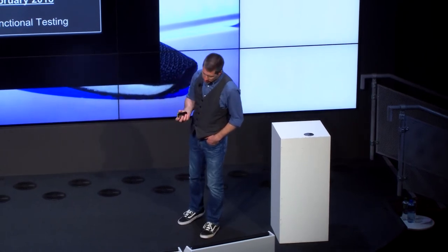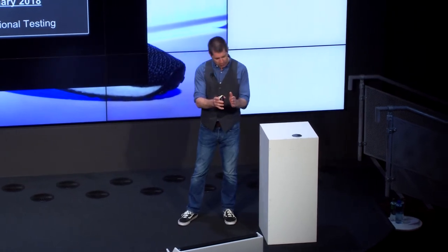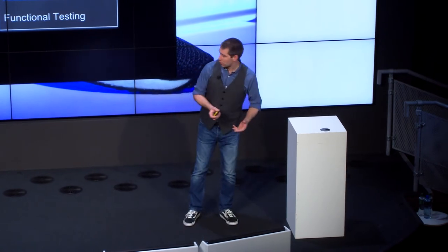So the way I wanted to structure the test was we would do a week test where we would start with a very small amount of traffic and trickle more in all the time. And this was just a smoke test. Work out if something was badly wrong here. You know, this is a lot of revenue at stake. So we are literally just looking for some red flags of things going badly wrong.